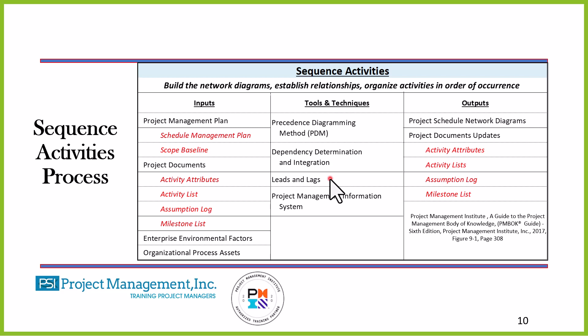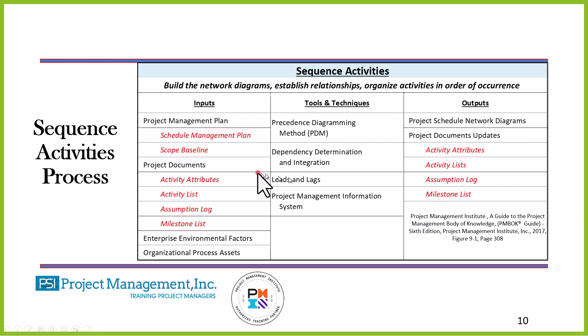For example, I pour the footing on the house and have to allow the concrete to cure before I build the foundation — that's a lag. A lead example: I finish painting one room and start putting the flooring down before I finish painting the inside of the house. The project management information system is where you store all of your projects. The output is the project schedule network diagram. And we have project document updates — progressive elaboration — as I'm doing this process, I learn more and update the appropriate plans and documents.